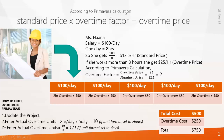According to Primavera calculation, the standard price of a resource multiplied by the overtime factor gives you the overtime price. So using this equation you need to find the overtime factor.